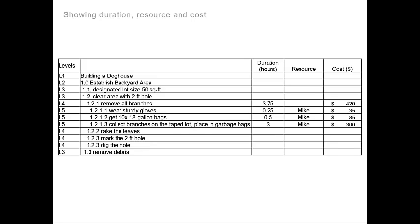The hope in doing all of this is so that you can have everything covered, but there are always unpredictable events that occur and risks that can affect the WBS. That's why if there are ever any uncertainties in an activity, it should be represented in the buffer time that you allow for in your scheduling.